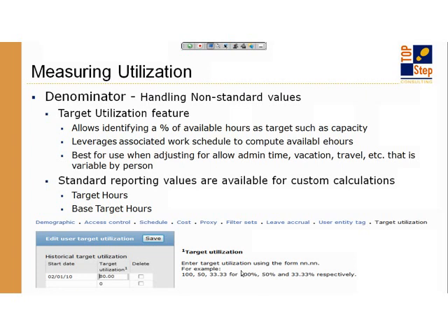Target utilization is a great way to identify what capacity is, or the definition of available hours. So if your available hours for people to work is something different than base work schedule and work schedule, you tend to start looking at target utilization to define, okay, so how many hours per week can I realistically expect people to work in the company? Okay. And when I say work in the company, I mean productive work, things that contribute to revenue, perhaps,